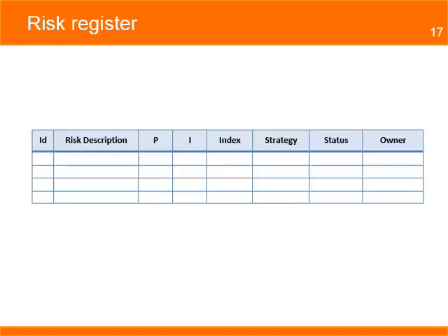It is a good project management practice to review the register and update the levels of probability and impact based on new information. It is also quite common that new risks will be identified and the team will need to update the register.